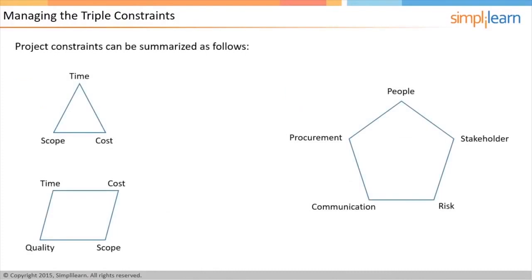Any project can be done successfully if there is no constraint on time or there is unlimited budget available. Unfortunately, that is not true in real life. A project is performed within some constraint, and these constraints are usually competing. Therefore, if you change one, it would affect the other. For example, if the project duration increases, it would lead to increase in the project cost as well. Triple constraint is a term that originally referred to the three competing project constraints within which the projects are performed.